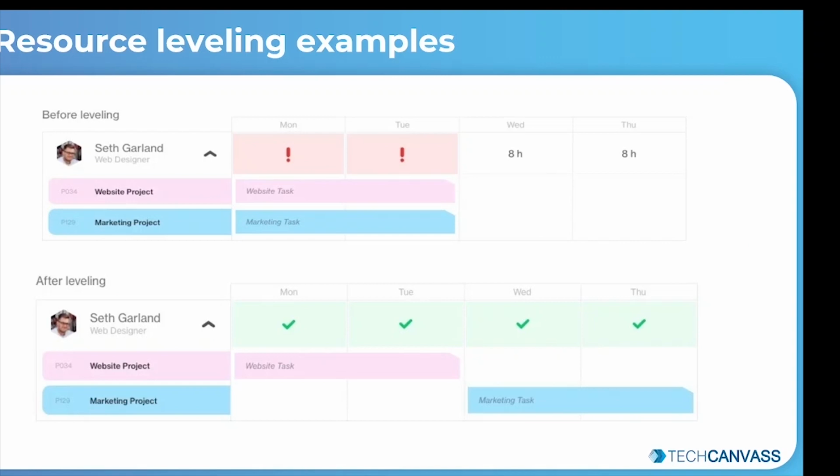An obvious example of resource leveling would be moving start and end dates of tasks to balance the workloads and to avoid over or under allocation of resources. Here is what is meant exactly by those terms. While over allocated resources have more work than they can complete within their normal 8 hours schedule, under allocated resources have spare time to dedicate to the project and task.